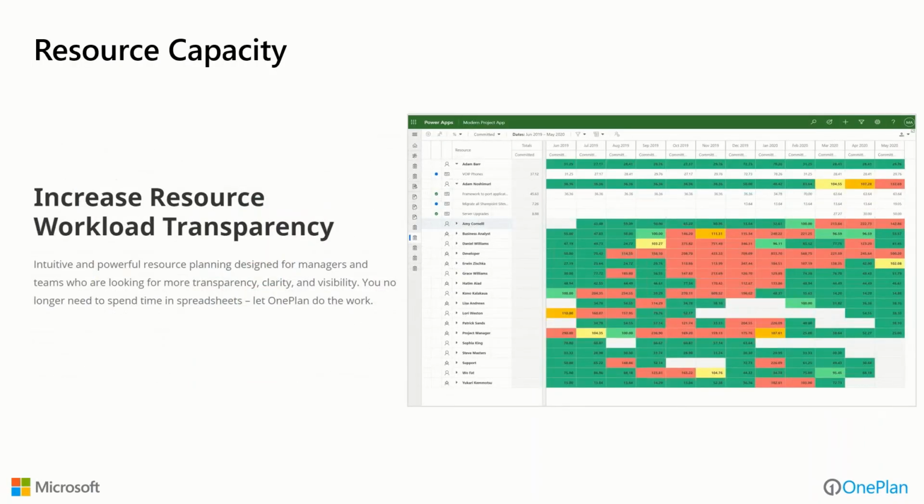Resource capacity planning, where we want to look at, maybe early on, high-level capacity of what resource types we're going to need to see: do we have the bandwidth to actually fulfill on these projects, and then ultimately replacing those with the individuals that are going to have to work on that. Being able to flexibly plan on a time-phase basis what we've originally committed, maybe look at what's being scheduled in detail, and then possibly even capturing what's in a timesheet and looking at how we're actually spending those resources. Very detailed resource management capability provided by OnePlan added to the mix.